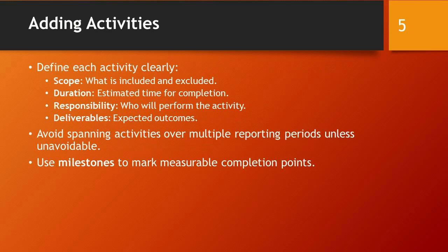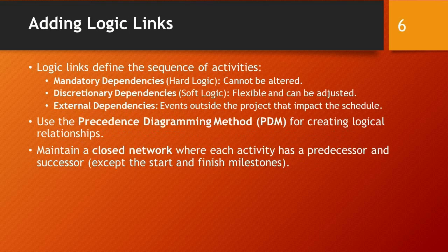Define each activity clearly by outlining the scope, which includes what is included and excluded, the duration, which is the estimated time for completion, responsibility, indicating who will perform the activity, and deliverables, which are the expected outcomes. Avoid spanning activities over multiple reporting periods unless unavoidable, and use milestones to mark measurable completion points.